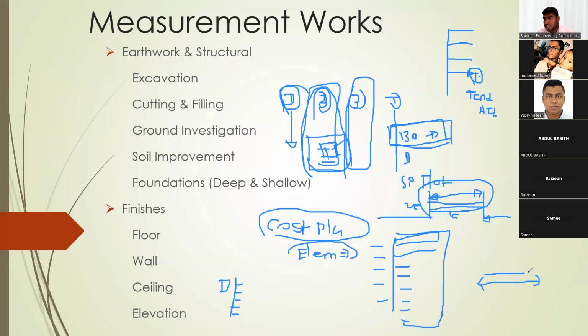During the evaluation period, if you have any question to ask the contractors, you issue the question to the contractors through a post-tender clarification. We call it PTC. You can ask a series of questions through a post-tender clarification. So that is called post-tender clarification.